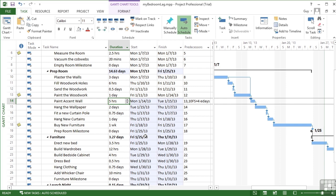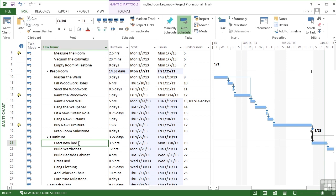So the lag is used to add on an extra delay. So it doesn't just go straight from one task to the next. Same with our buying new furniture and erecting a new bed. Well, we can't erect the new bed until the furniture has arrived. Well, after buying the furniture, there is then a four week delay before the furniture arrives. That is one heck of a delay.